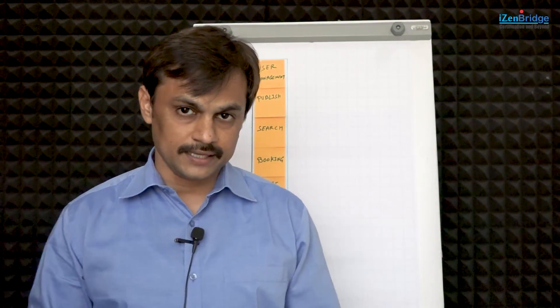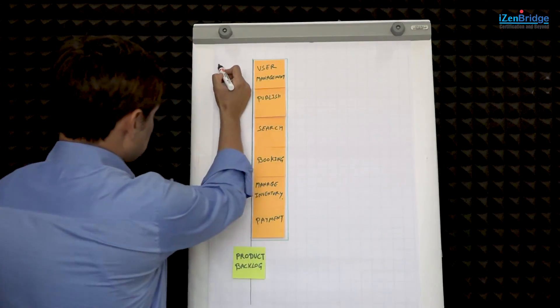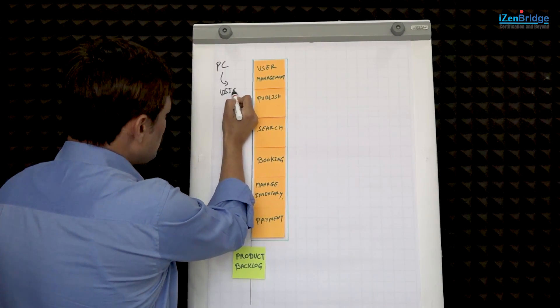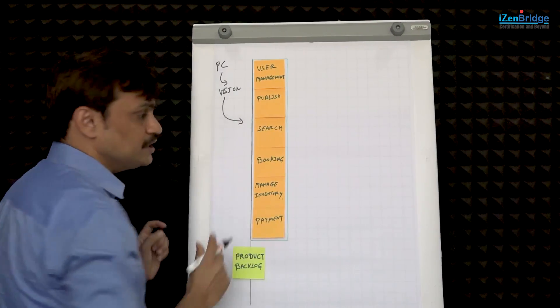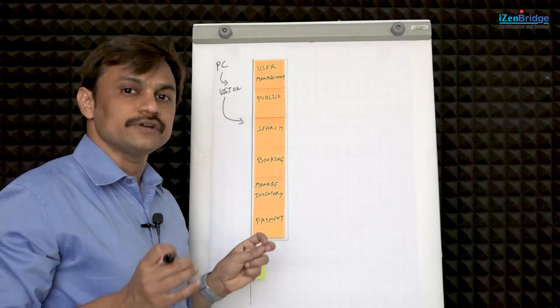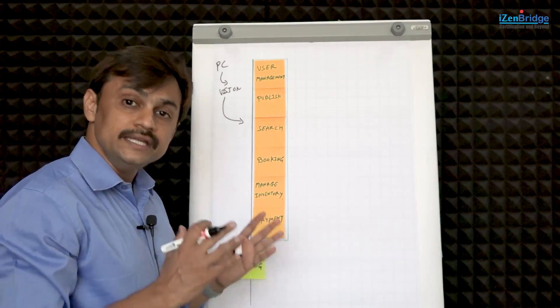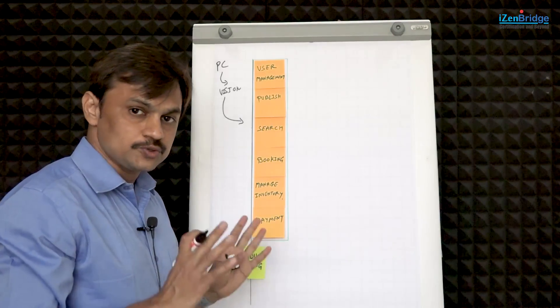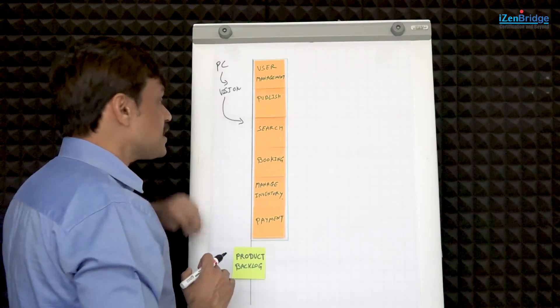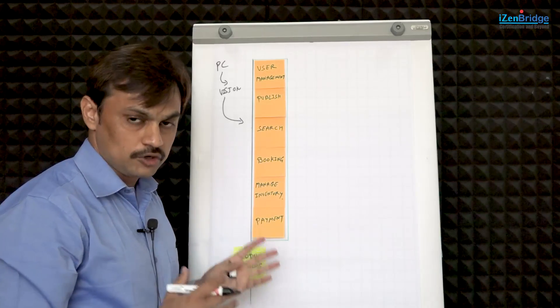Say you initiate a new project and you are working in the adaptive lifecycle — the requirements are going to be discovered as you go along. Initially, with the help of your project charter or a project-level vision, you get some idea of what we need to make. Your first product backlog will be a collection of high-level requirements discovered based on your initial understanding of the goal, and you may also interact with stakeholders to find those initial requirements.